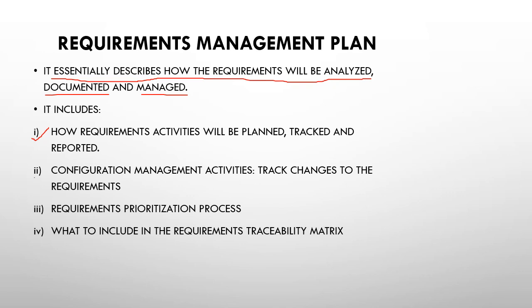Configuration management activities: how to track changes to the requirements, how changes to the product will be initiated, how impacts will be analyzed, how they will be traced, tracked, and reported, as well as the authorization levels required to approve these changes. So it also includes the configuration management activities, which basically track the changes to the requirements that we have documented.